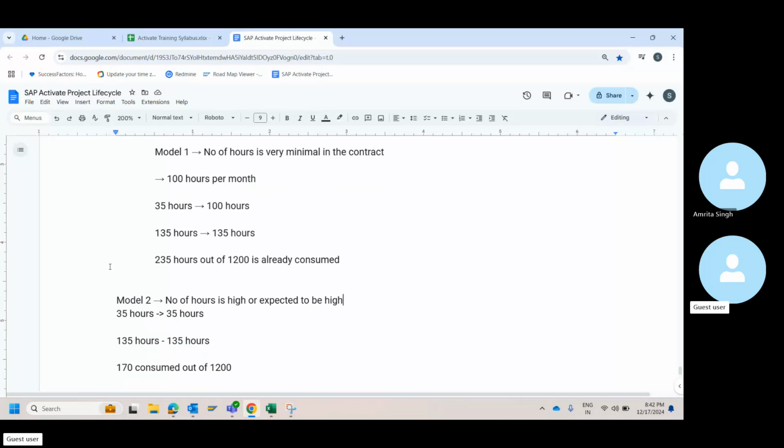So at the beginning of 6 months itself, you see a risk that it is going to be consumed. This is what risk management is. You have a contractual risk that you will consume all the hours by the eighth month, so you take the conversation of change request. You talk to them and close the change request by the eighth month, before you close up the 1,200 hours. You get a new CR, you get the additional hours, and you bill for that. That's how it works.